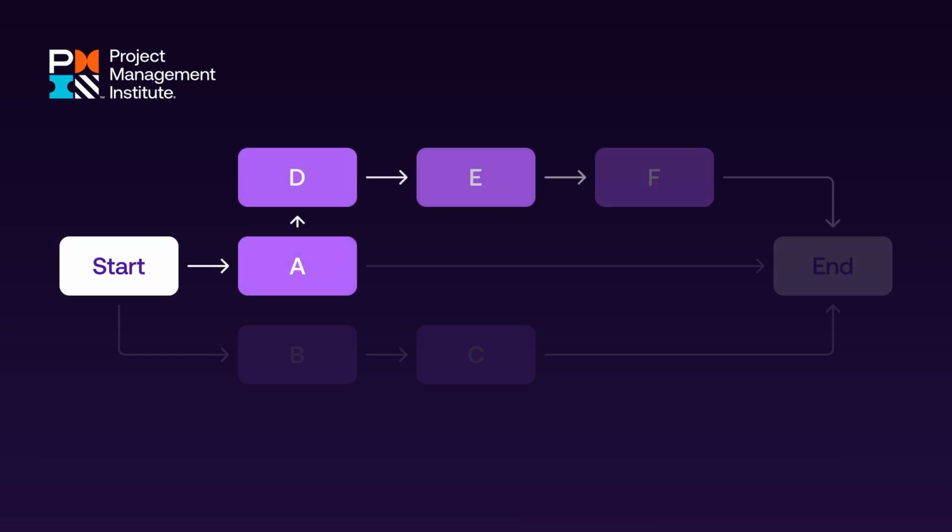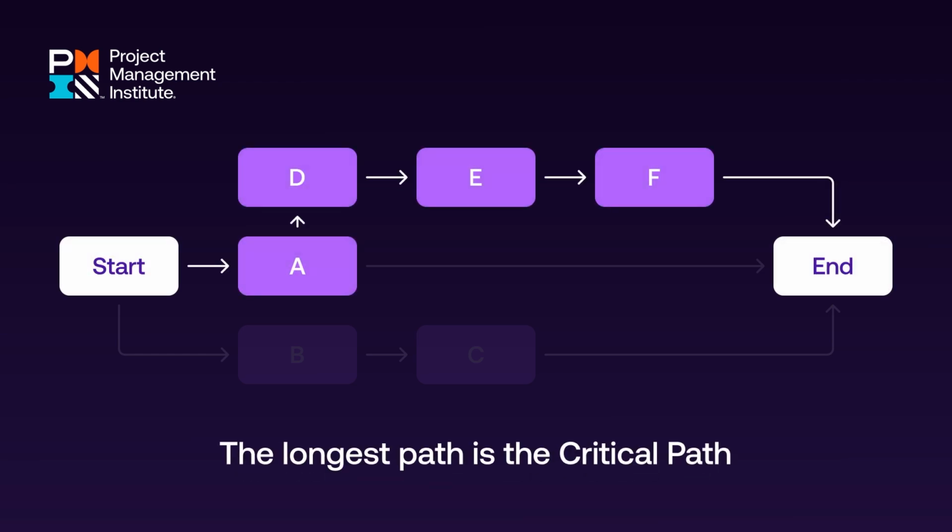Determine the length of each path in the diagram. The longest path is the critical path.